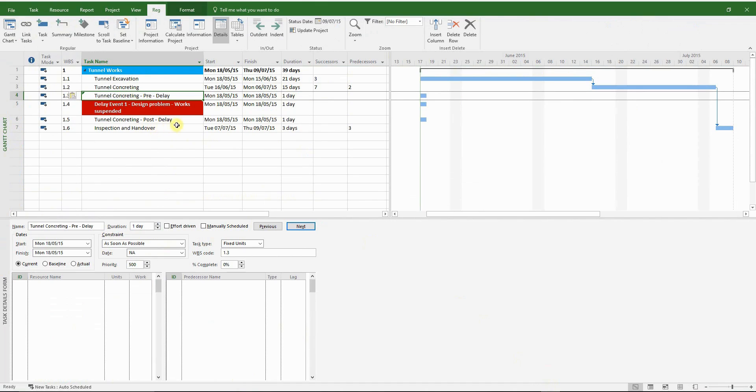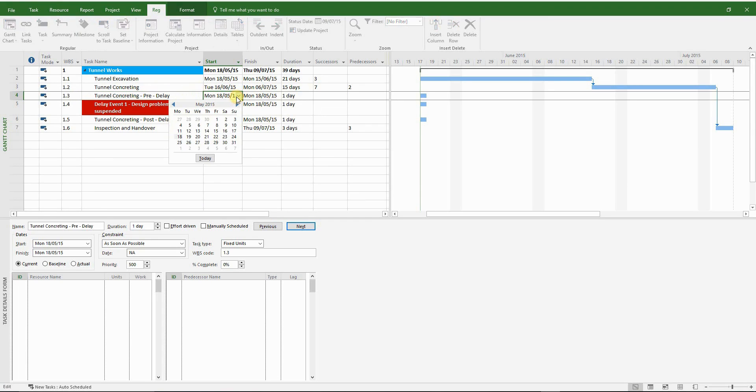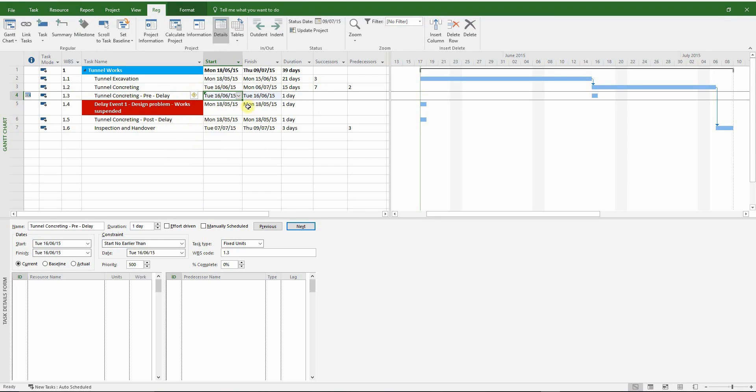And subsequently, we'll zero it out so that the whole program will collapse by the actual as-built delay duration. So if you just follow what I'm doing on screen, you will understand what I'm talking about.